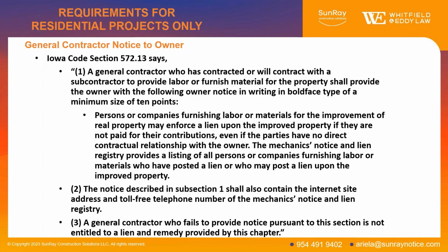For residential projects, though, however, it's different. There's quite a few notice requirements, and the statute is created to protect the homeowner. Okay, so keep that in mind. And so the first notice is what I call a general contract notice to the owner. And right in the middle of the slide, you'll see the language that has to be given. And you'll notice it has to be in boldface type, a minimum size of 10 points, and you have to have that language in there.